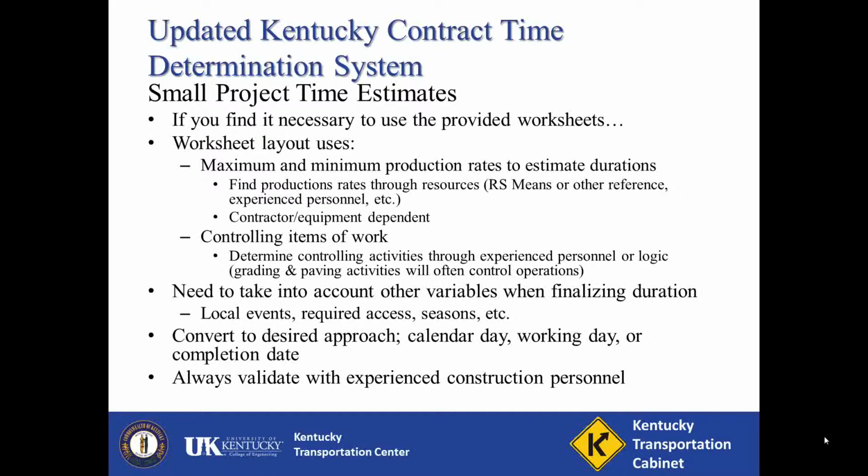Once you complete an estimate of time, this is in the form of working days. This will need to be converted to the approach you select, calendar days, working days, or completion date requirements per the previous discussion. When making these conversions, you must consider weather and seasonal limitations. Once you have a contract time estimate, always validate it with experienced construction personnel.